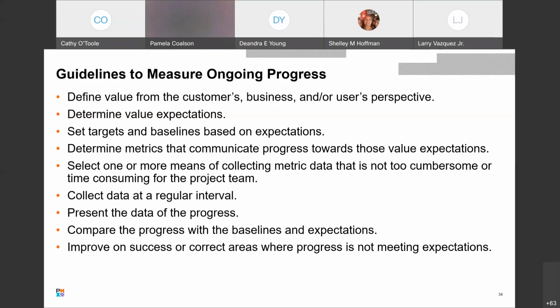so that you can present that data to your customers or your stakeholders to show them how much your project's on track or not. And if you had set a baseline, to say, oh, well, we plan to be done with this deliverable by X date and the next deliverable by Y date, then you can show them where you are with that and whether you're on track or not. So that's kind of a practical example of how to do it.